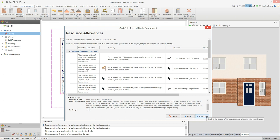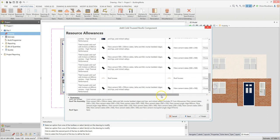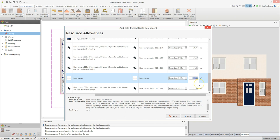Now depending on the type of roof and the specified materials, you may see one more screen which allows you to check resource allowances. In this case I can check and edit the allowance for the tiles and also the roof truss allowance. Scroll down the window and check the figures, changing them as necessary. Note that you can later review these costs from the resource price allowances tab on the estimate dashboard. Once you're happy with the resource allowances, click finish.